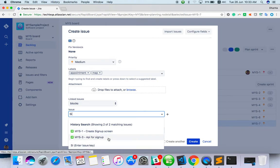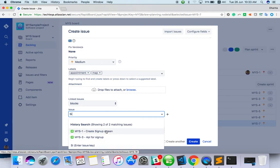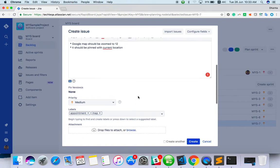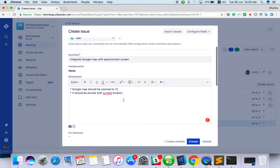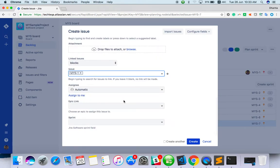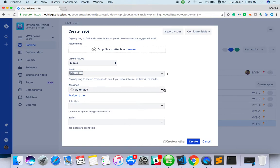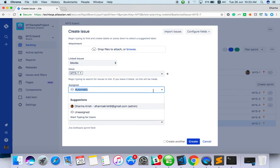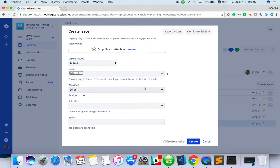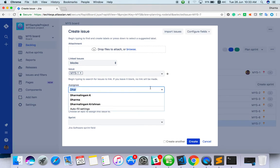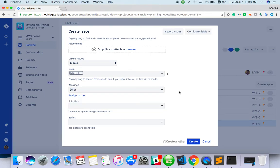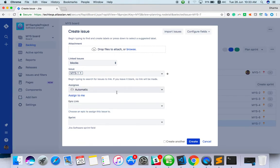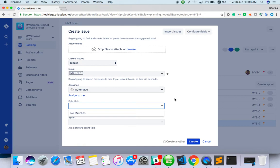I haven't created anything for design, so you can mention. This MSY-1 should be completed, then only you can start this task. It's automatic. Just type or assign to me, something like that. If you have added more users, you can assign to them. Actually, an epic link.